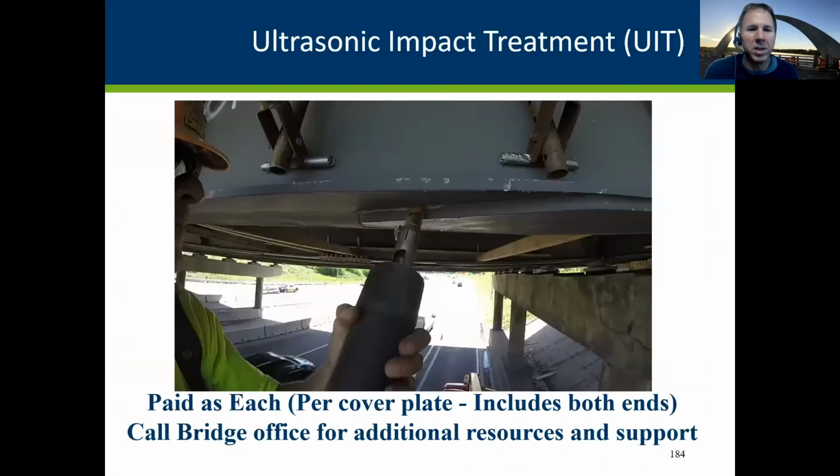This is an image of the ultrasonic peening going on. We have done it primarily on the top flanges that have been exposed in the bridge deck, thinking that the underside flange, the bottom flange, is generally inspectable. But in the metro, where they don't have routine access to interrupt traffic, we're starting to do these as well, just for cautionary sake, since we've brought in and mobilized the people to do the top flange too.